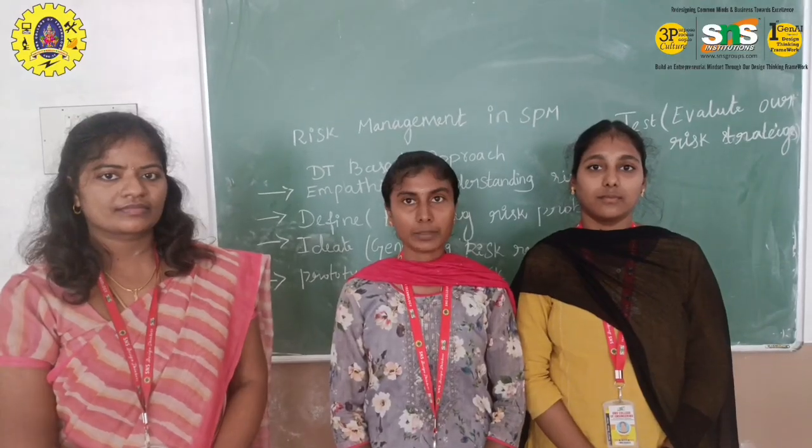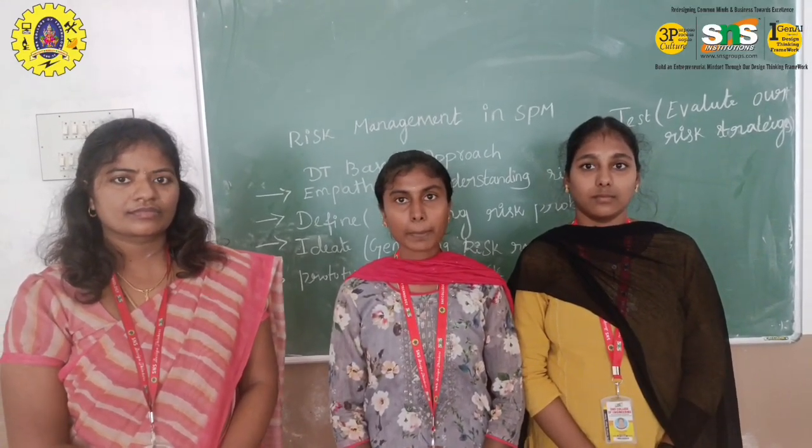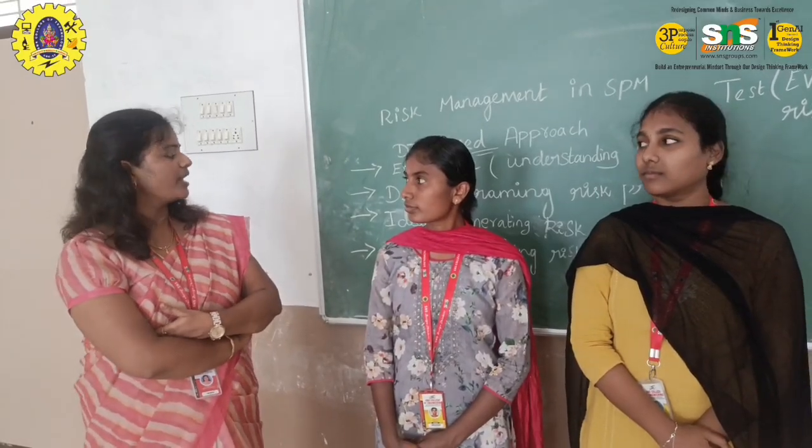Hi everyone, I'm Claudia. I'm going to explain the prototype phase of risk management. The risk register acts as a working document that records and identifies the risks. Details such as description, probability, impact, owner, and mitigation strategy are included. Stakeholders such as the project manager, IT security team, finance department, operations team, and vendors are assigned as owners of specific risks. For example, the IT security team may handle the cyber attack risk, while finance handles the risk of budget overruns. This also ensures clear accountability.